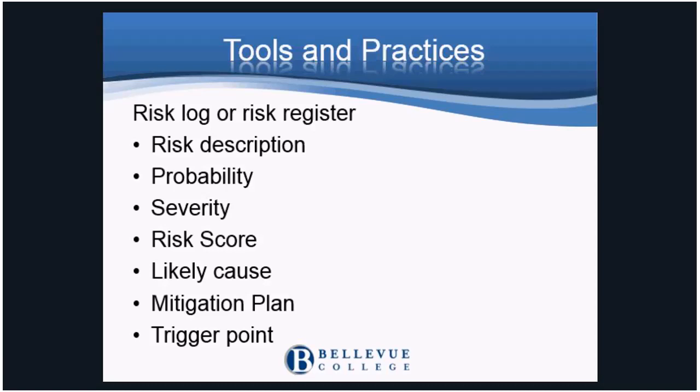Before the weights are determined, a detailed description of the risk needs to be created and agreed on by the team. This creates consensus and provides operational definition of the results if the risks were encountered. Those risks that were scored above the risk threshold need to be analyzed. A potential or likely root cause needs to be documented so that preventative steps can be taken.